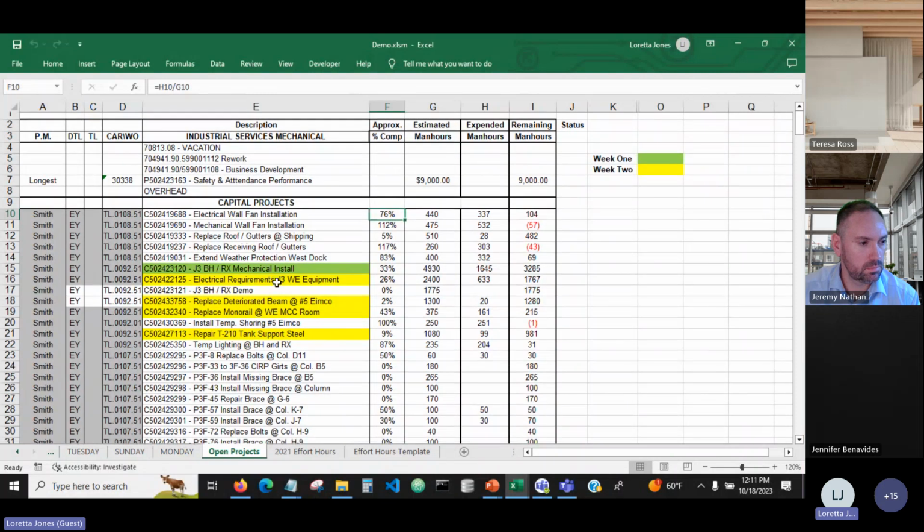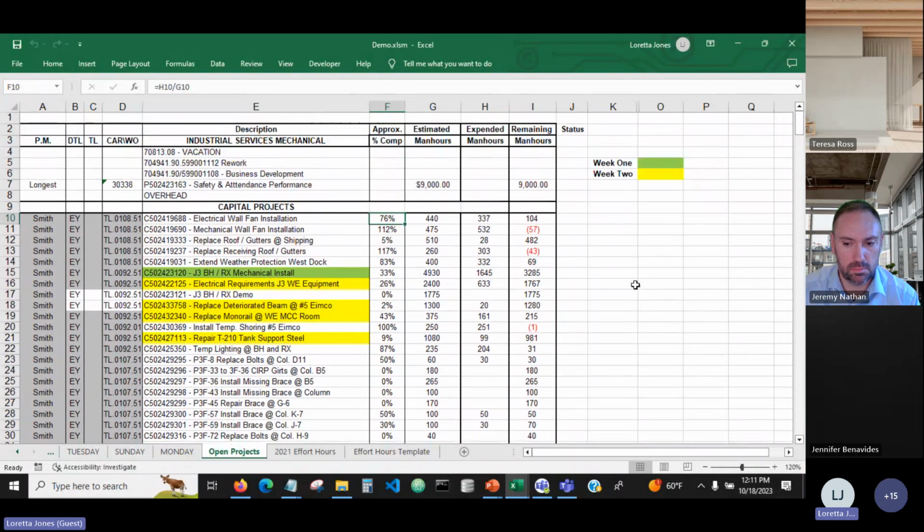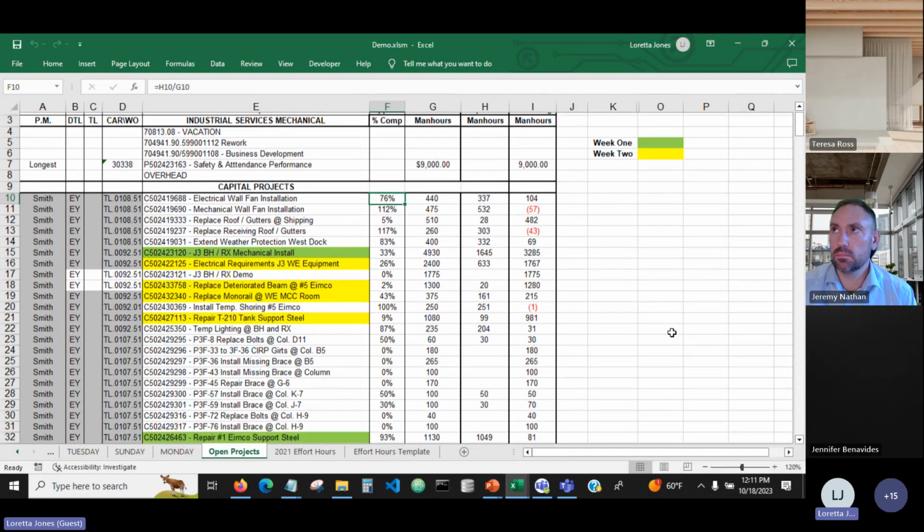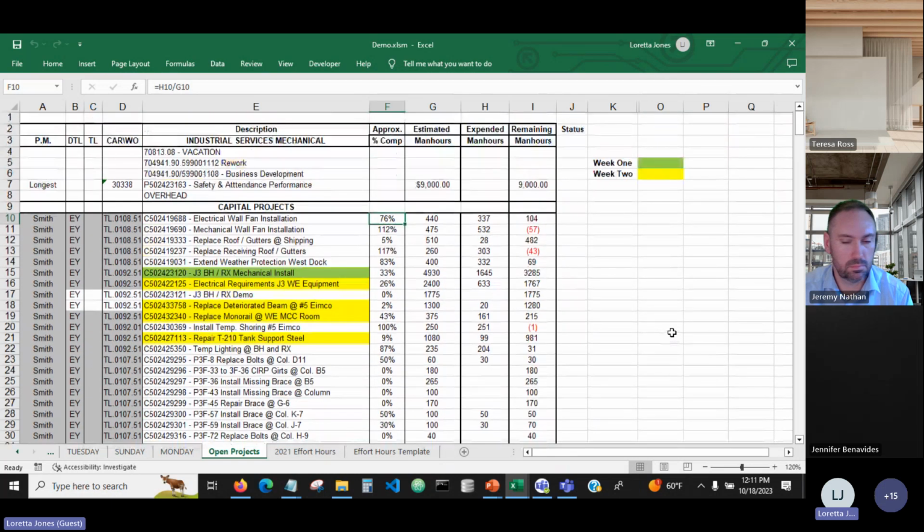One reason this is so instrumental in keeping things on track is if the client is not able to calculate this daily, he can use all the man hours in a job before he realizes it. So it's really critical that it's very interactive and updated.